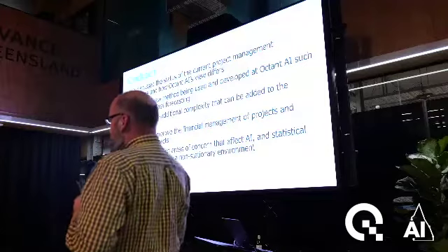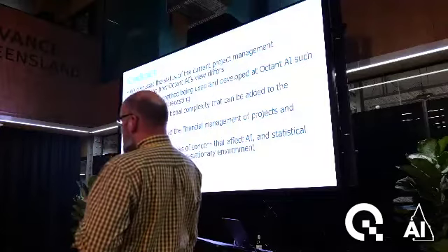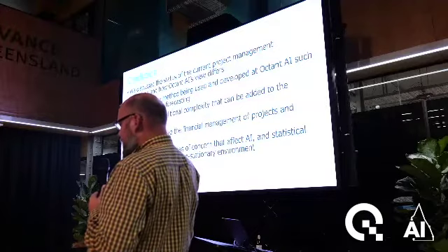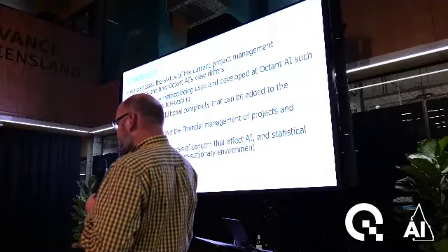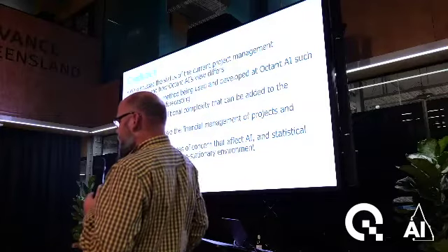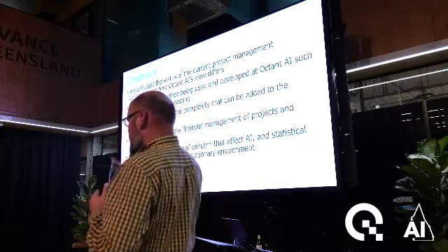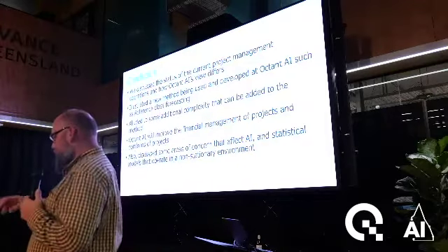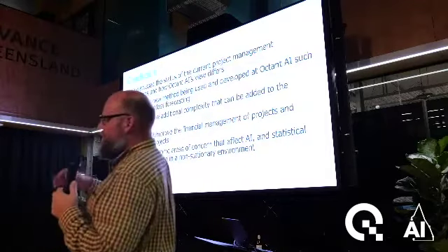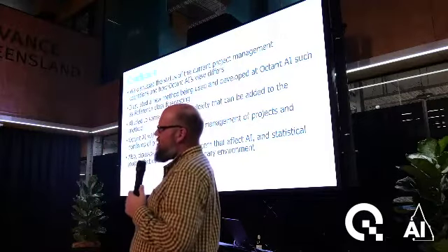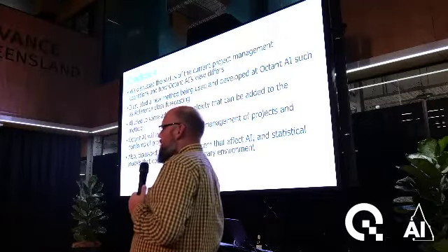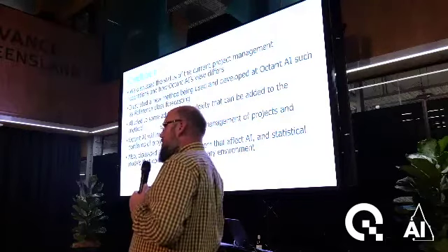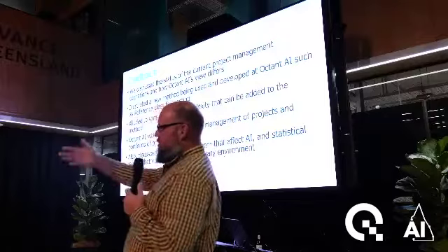In essence, that's the kind of stuff that gets done in many financial or energy industry companies. They'll call it earnings at risk. They'll have certain stochastic models, price models, or even volume models, and apply them to different parts of the portfolio, and put them all together through Monte Carlo simulation and correlations. So it's a common thing that happens outside of the project management industry. Even if you didn't do our method, you could try those methods.